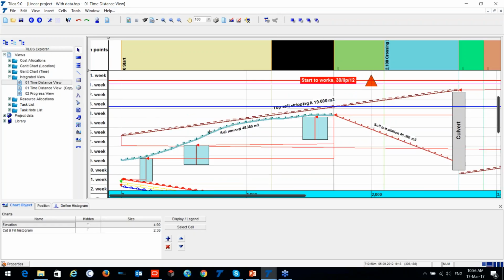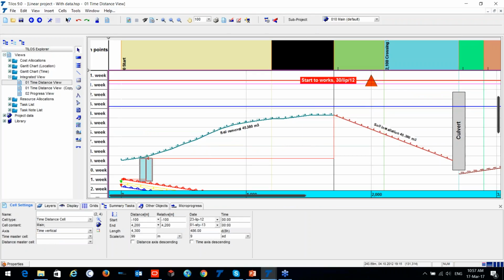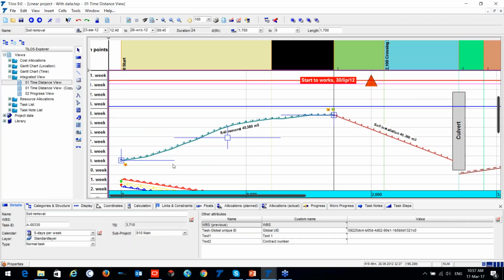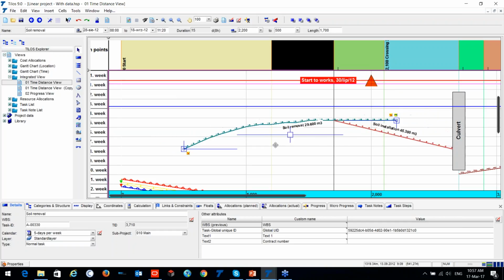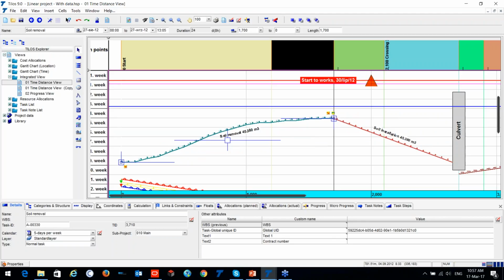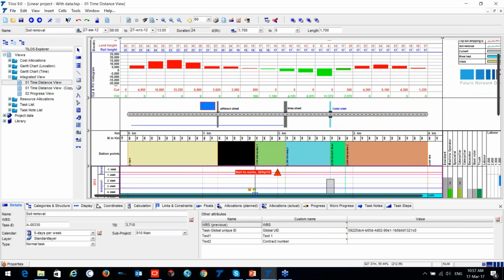So now, one thing that I would like to mention is, remember on the presentation part, we had the topic why we had the two breakdowns. Now, this is the subject of it. We have here my activity, which is soil removal, and the information is not just linear, it has some shape. Once I move my activity, it becomes a different shape. Why do I have it? Because it's getting the information from my profile data, which means right from above.